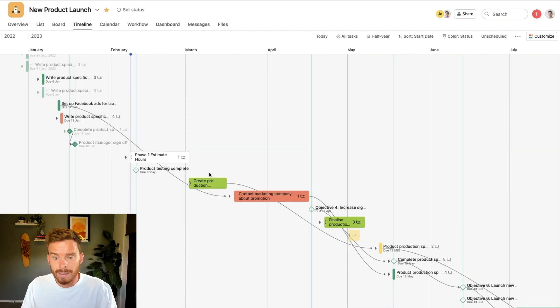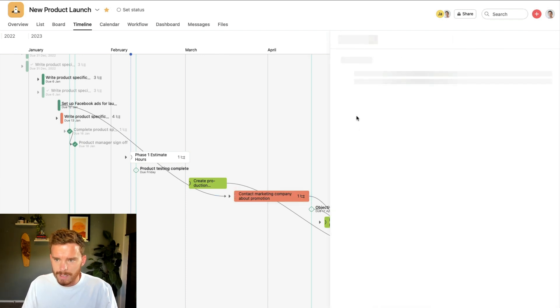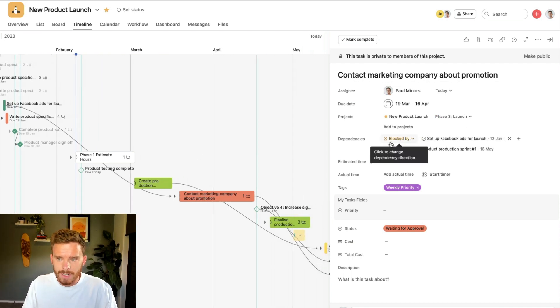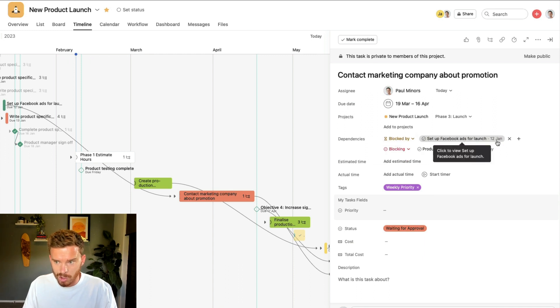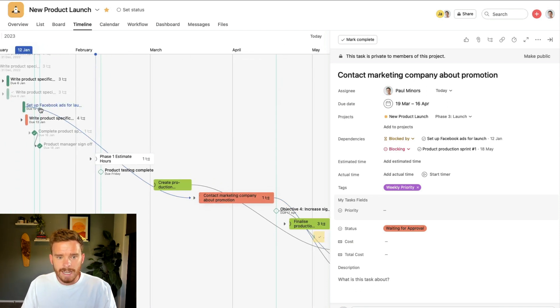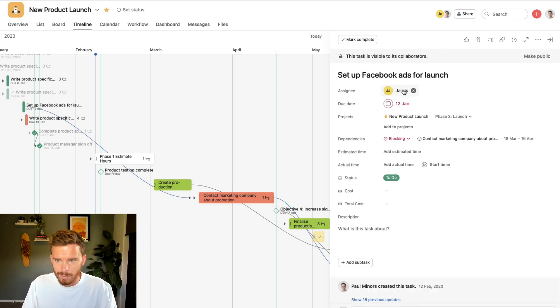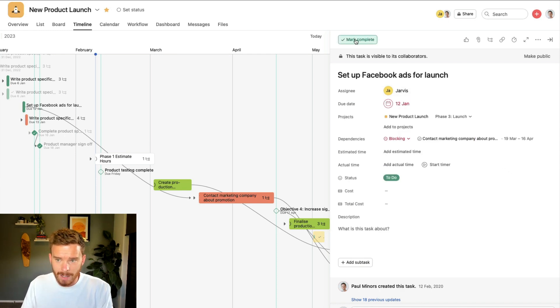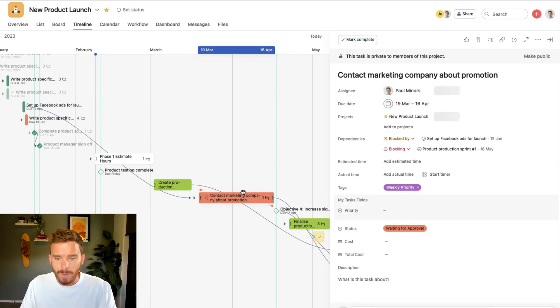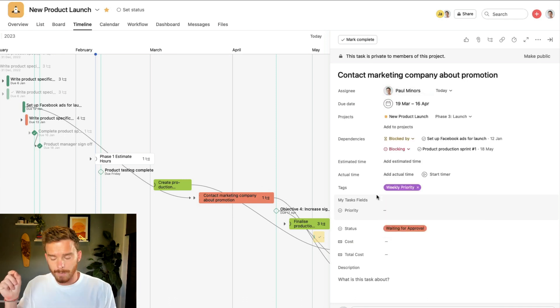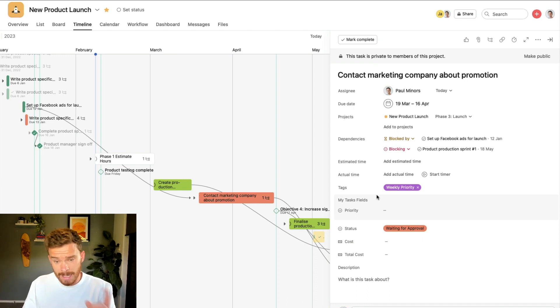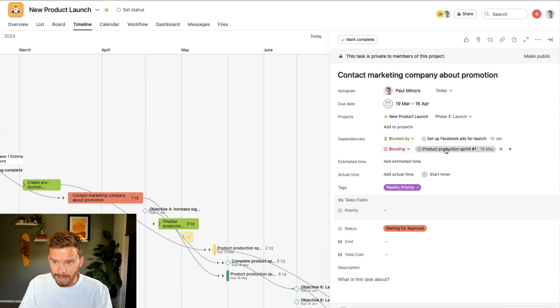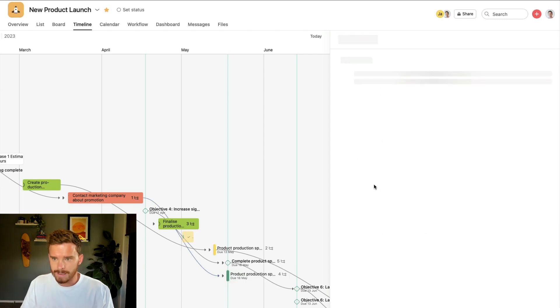My next few tips are related to dependencies, which are these arrows you can see linking tasks here. So if I click on this task, contact marketing company about promotion, you can see it's actually linked to two different tasks. So firstly, it's blocked by the setup Facebook ads for launch task, which is due on 12th of Jan. So we can see that if I follow the arrow backwards, that is this task here. So this is telling me that I can't start this task until this one is done. I can see Jarvis is responsible for this. So when Jarvis completes this task, or if there's a delay to this task, I will get notified because I'm the assignee on this task.